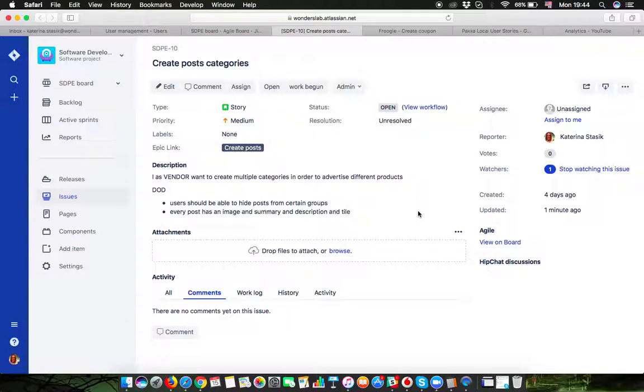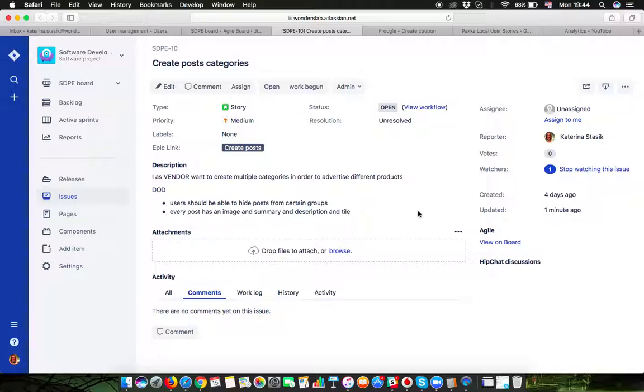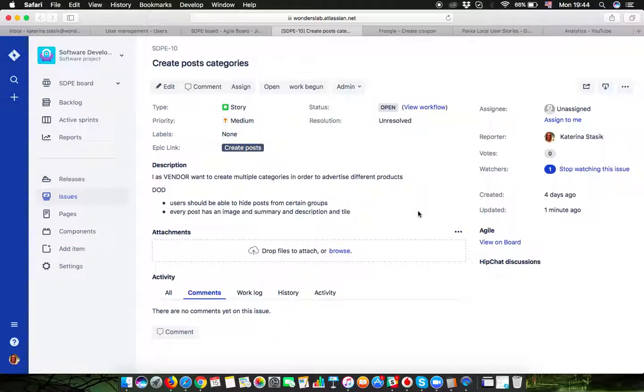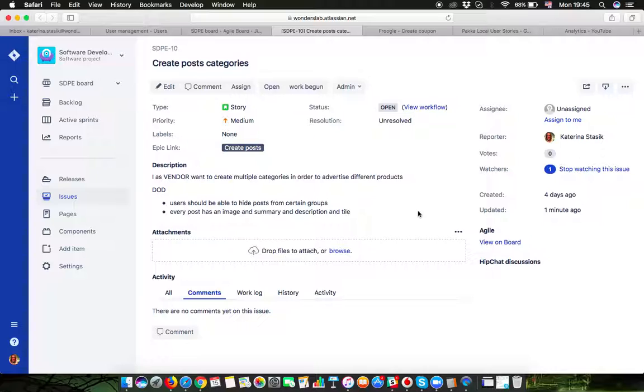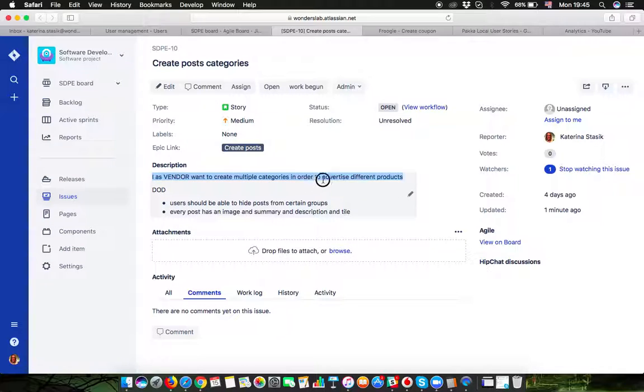Because a smaller piece can be explained in a simple way. The simpler you can explain your idea, the less room there is for misunderstanding. So try to divide, try to break down your product vision, your epics, your stories to such small parts which you can explain easily in one or two sentences and which you can support by four or five definitions of done.